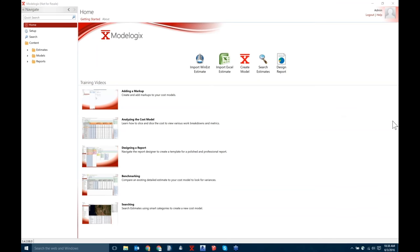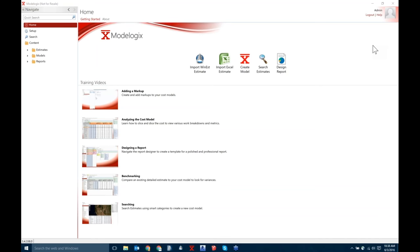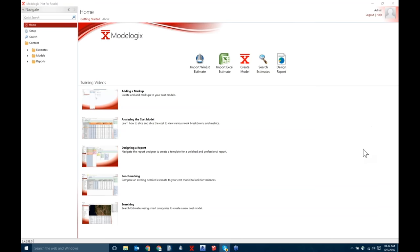I'd say start with one area, focus on that, get five or ten of those in the system, and you can kind of be off and running from there. So we've had customers get running with as little as ten projects in there. And really the data scrubbing exercise is the part that is the hump to get over. So it's all just going to depend on how your data is structured and how much scrubbing needs to happen to that data before it's clean enough to import in the system and use for modeling. And so start with your cleanest data first, get three, five, ten projects in there. And the other thing I'd say to that is a lot of companies have used Modelogix as a catalyst to get clean data coming out of their estimators and out of their project managers. So they say what they like to do is get a few projects in the system, show kind of the end game to their estimators and say, guys, look, if we could get data in the system clean like this, man, look what we could do with it.